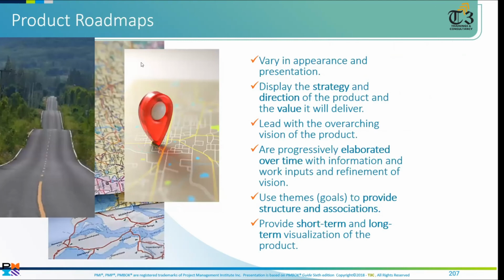So we make the whole WBS. Whether it's predictive or iterative, we make the product roadmap. What is product roadmap? What I was telling you yesterday, how your product will be delivered, like a milestone list: I will give you this feature after 1 month, this feature after 2 months, this feature after 3 months. And to perform this, how many iterations you need to perform. This is called product roadmap or feature roadmap.